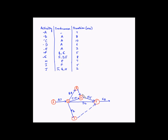Activity H is dependent on the completion of activity E. We can start activity H from event 6, since that node marks the end of E. H has a duration of 7 weeks.